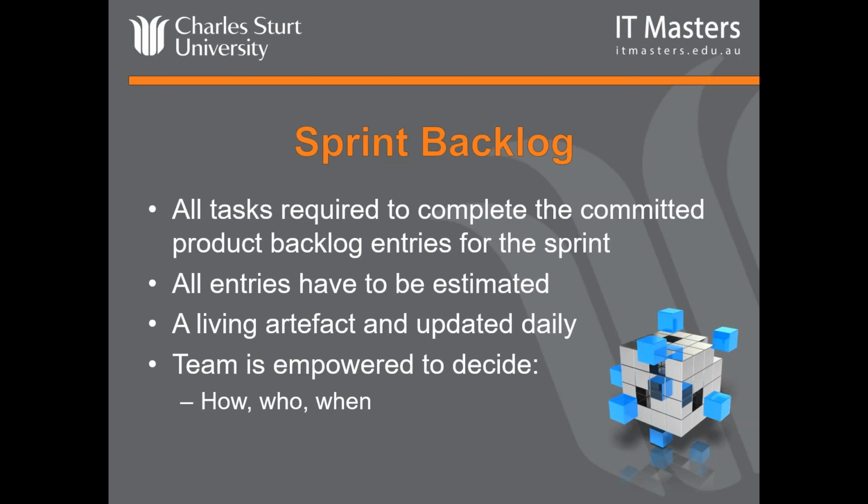So the sprint backlog is a living artifact. It's updated on a daily basis. At the end of the day, all the remaining efforts are updated, and this defines how much work is left until the sprint goal is reached.